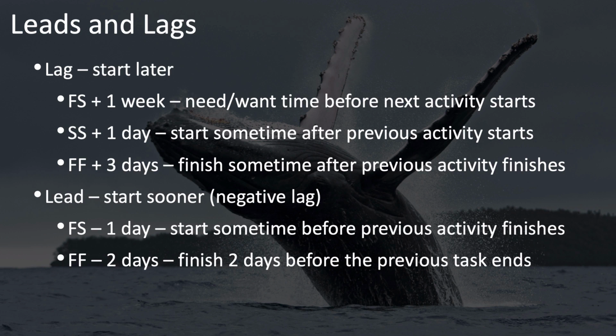Or you may have poured the driveway, and that needs some time to cure before you start driving on it. The pour could be represented as activity A, and then building the walls on top or driving on top could be expressed as activity B, but there needs to be some delay in between those. So you need to finish one and then wait, say, a week or more before the next activity starts. That's a 1 week lag between activities A and B.